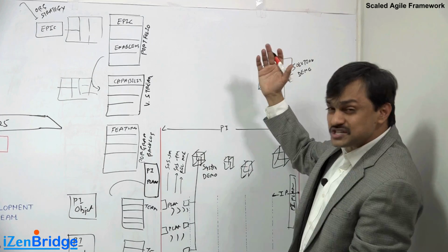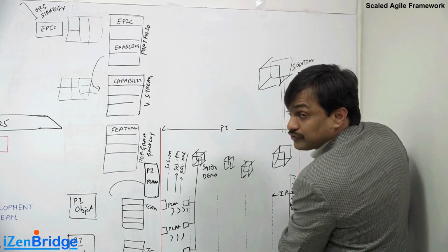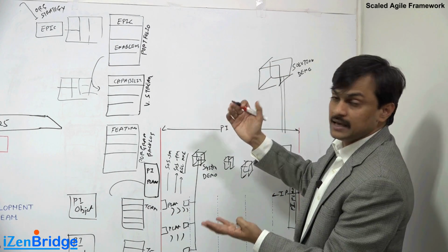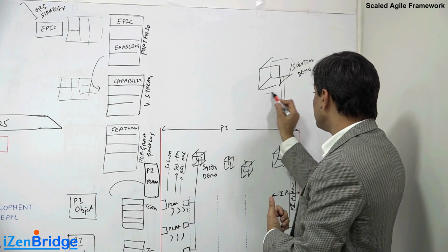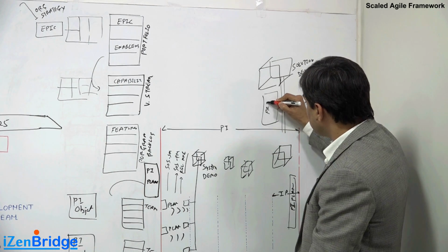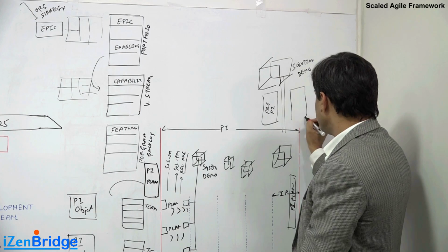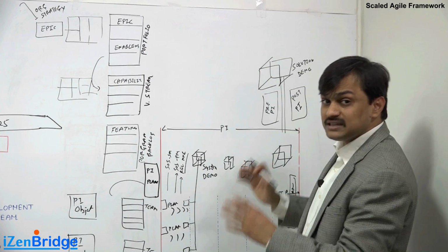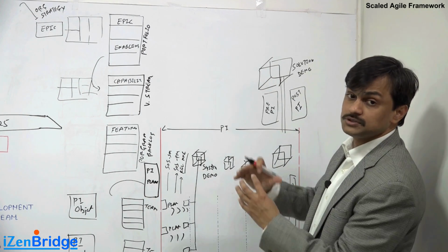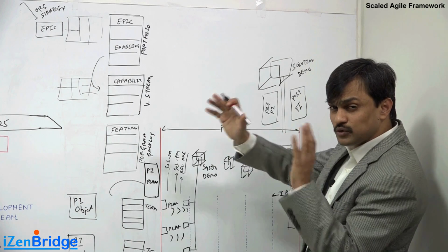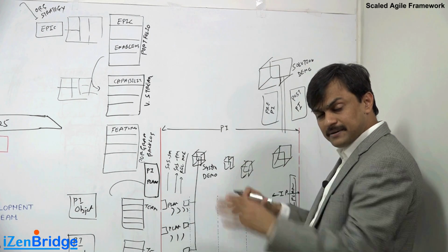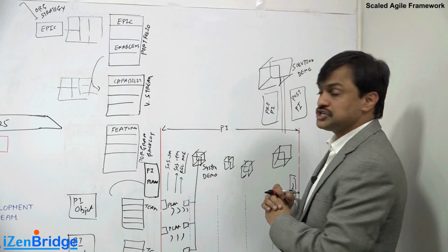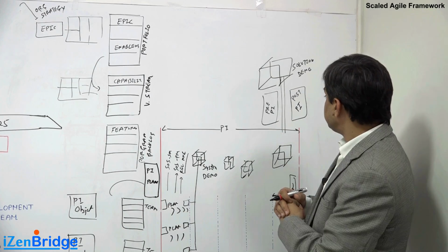When we are thinking of value stream level planning, the PI planning which we are doing for our own program may also get influenced by it. That is why at a value stream level, we do have a pre-PI planning meeting and a post-PI planning meeting. If we have 3 teams or 5 release trains, before they get into their detailed PI planning, they all come together, they do pre-PI planning, they understand what we want to do, they go into their own PI planning, they elaborate everything, they may face some challenges, and then they bring all that feedback together and share it in a post-PI planning meeting.